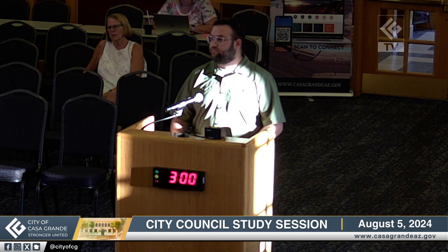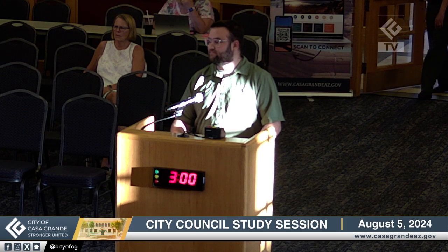How deep are they? I mean, some of it is as deep as 24 inches. I know the stuff that we ran into on Pinal, unfortunately, with our sewer line, which is going to create some delays getting underneath the state highway, it varied. What was the range? Anywhere between 6 to 10 feet, which is very, very uncommon for fiber. Typically, 24 inches is a standard. But 10 feet? Yep. Wow. So that created, ditch witch didn't work very good, did it? No. Well, they were boring, so if they're not maintaining their horizontal control, it can create some real issues. And this was all put in after we did our potholing and located all the utilities to do our design. This happened in between that and the start of construction.